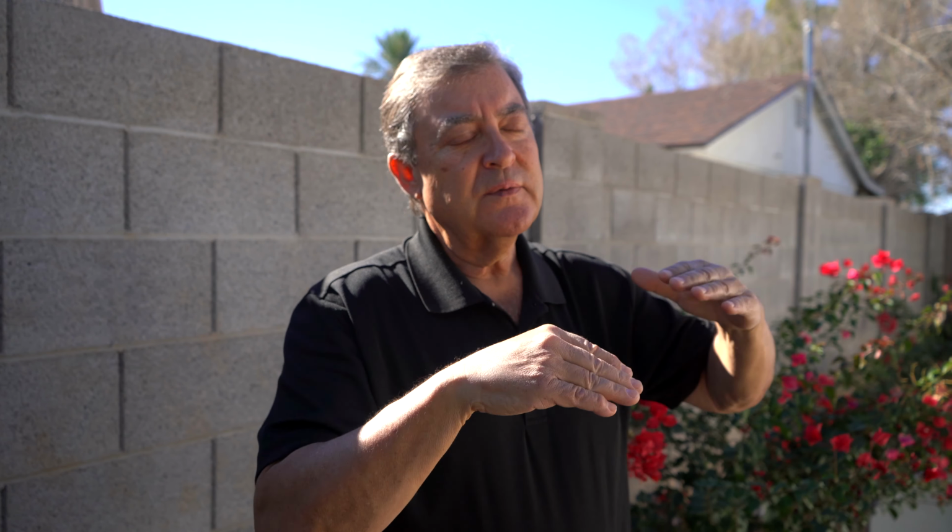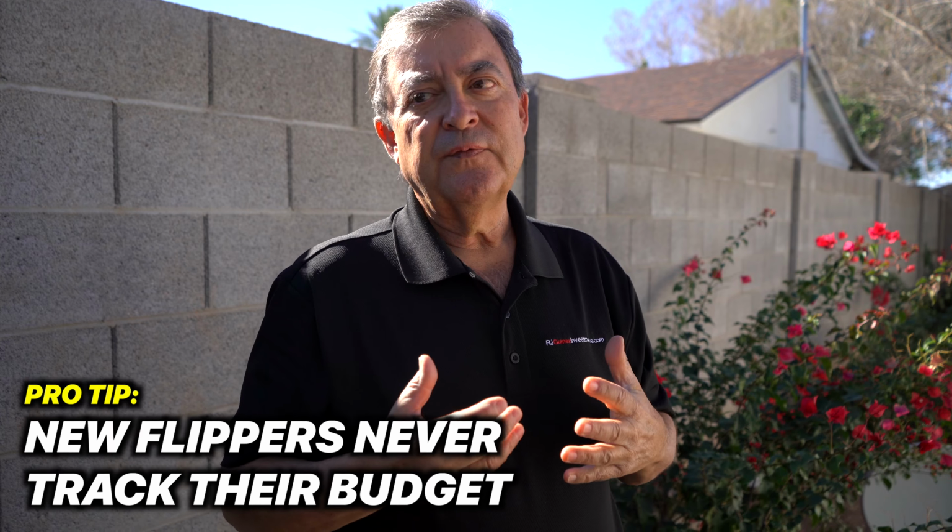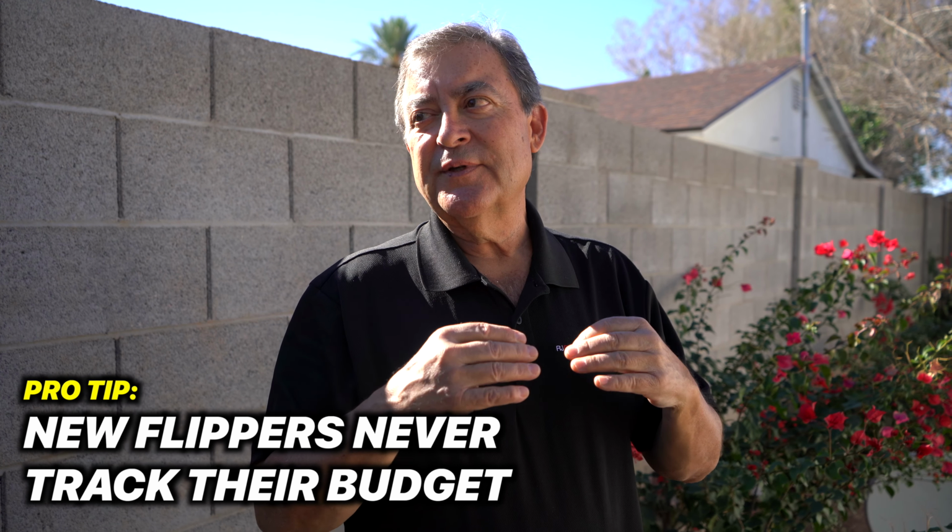Overall, our budget, and it's very important to have a budget, we review it weekly. So we want to know where we're at, because there are things we didn't plan on. We got to see where that is. That means I got to cut back over here and stick with that budget. That's the biggest issue I see with new flippers. They don't keep track of what they're spending, and before they know it, their costs are out of line.